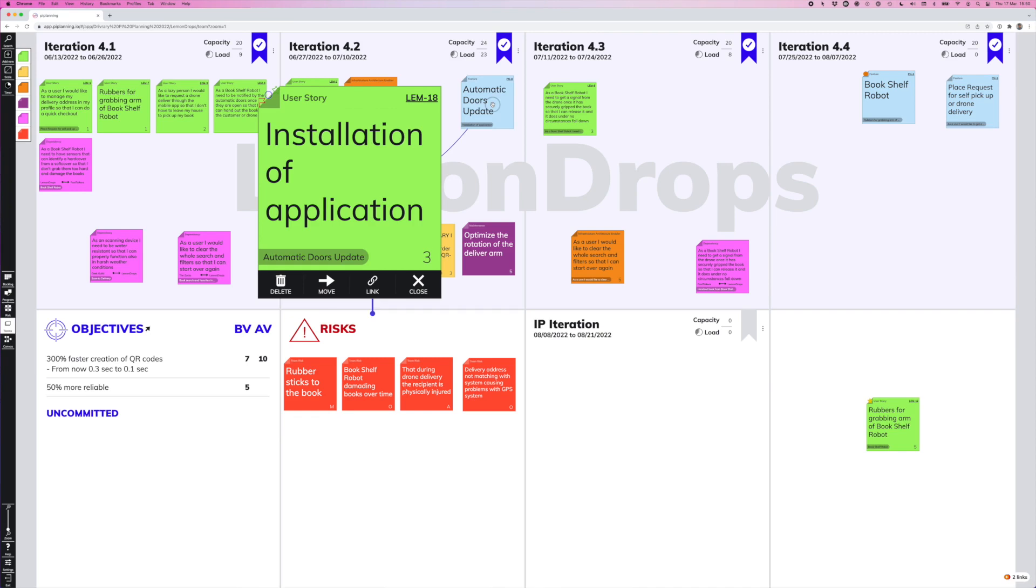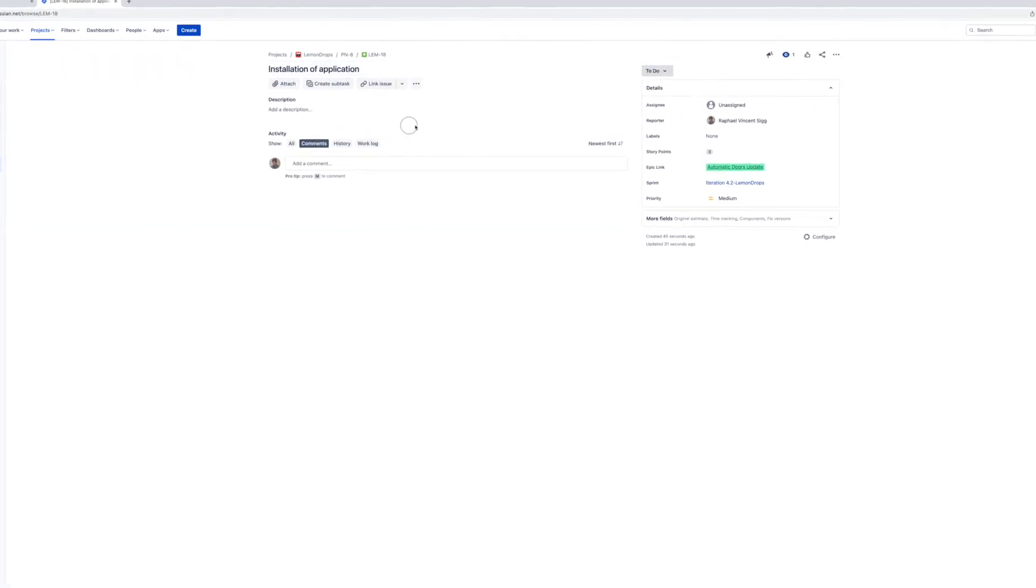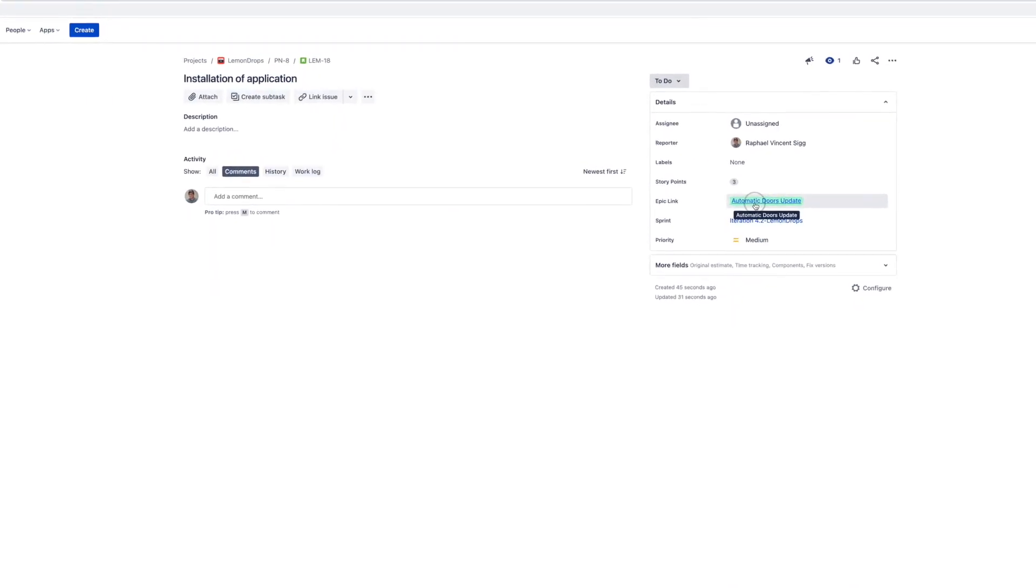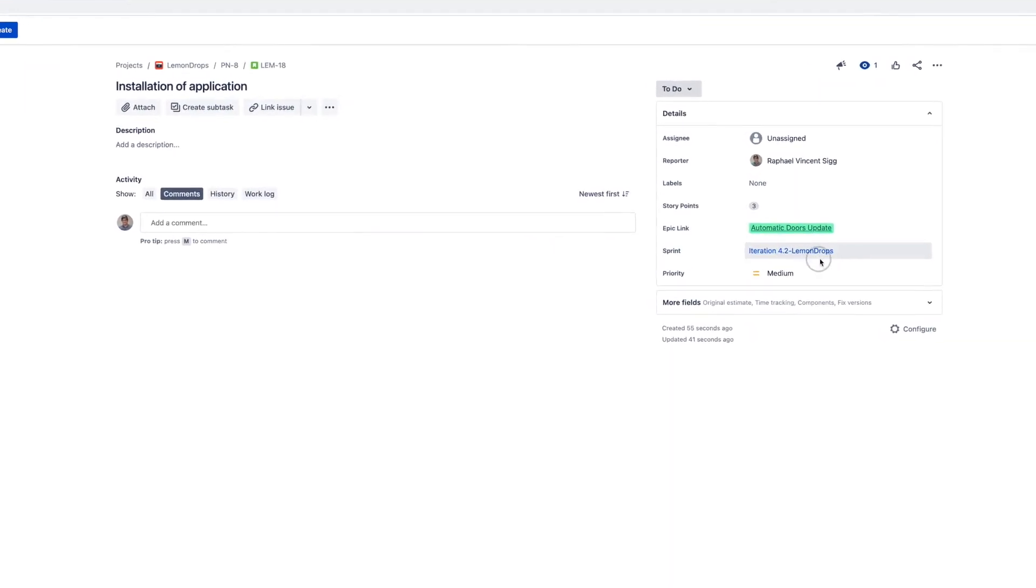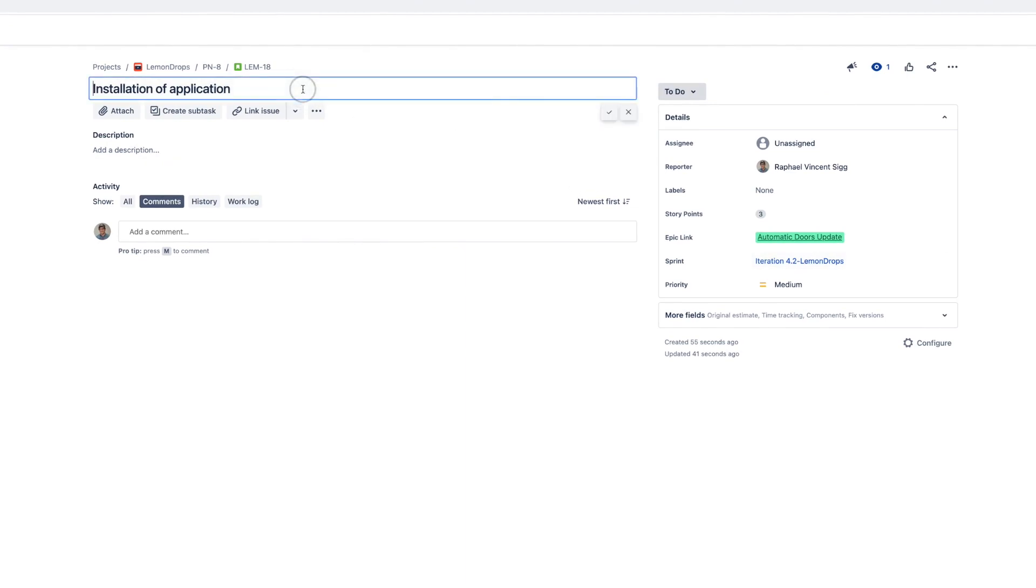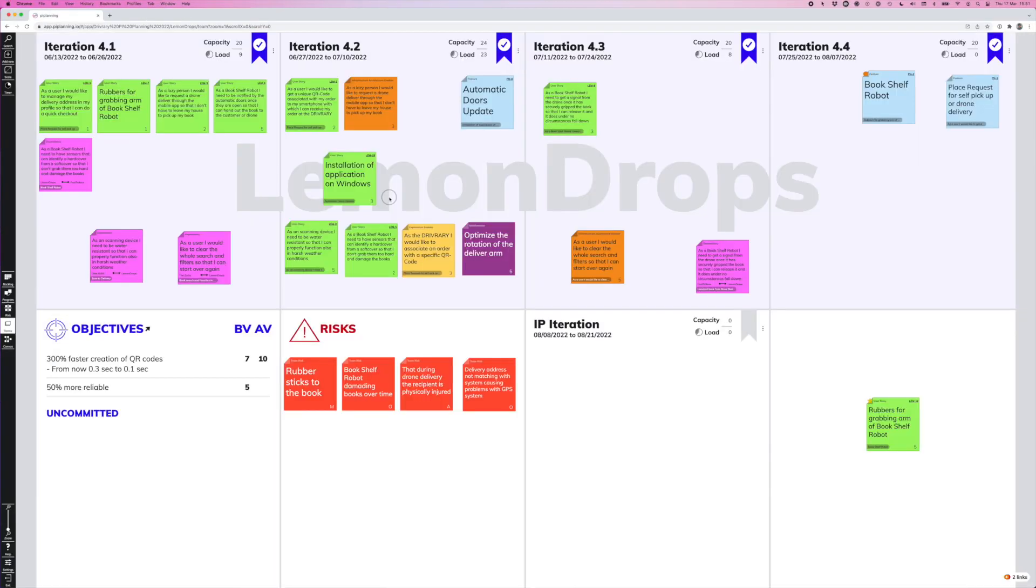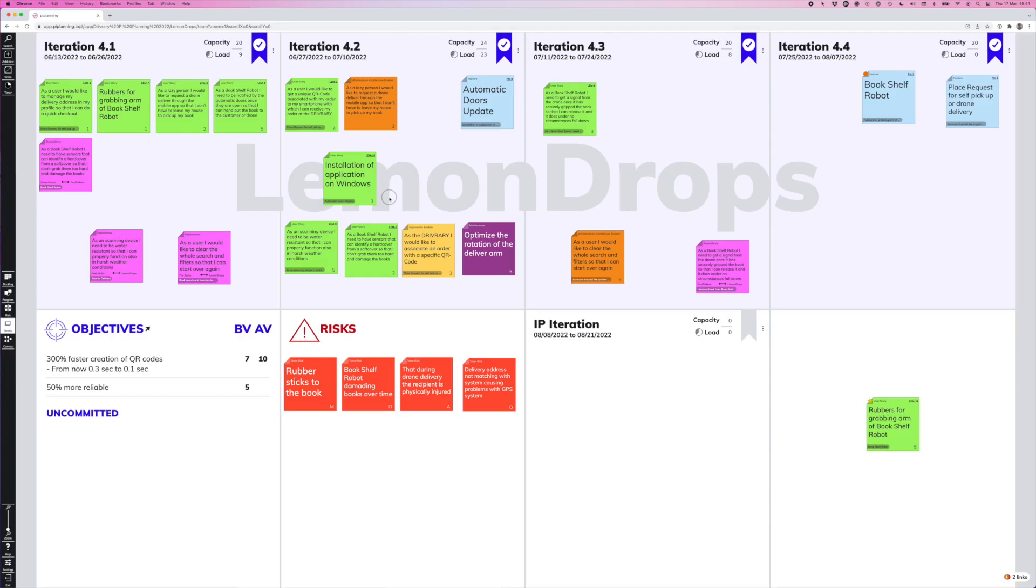Now, something that you may have noticed is that the user story instantly got this ALM work item ID. Now here, we synchronize it with JIRA. So this is a JIRA issue key. And this is also a direct link to JIRA. So we can click on that and it brings us directly to the item in JIRA that we just created. So with the summary that we wrote, with the story points we applied three, with the link we created between the story and the feature, and in which iteration we planned it. And now we can also add some text here, for example, let's say we installation of application on Windows, and we apply that. And once we go back to the PI Planning app, you can see that this is in a real-time bi-directional sync. So we created it, it got created in JIRA, we changed the text, it changed the text on our board. So they are always in constant sync, and you don't have to worry about your single source of truth.